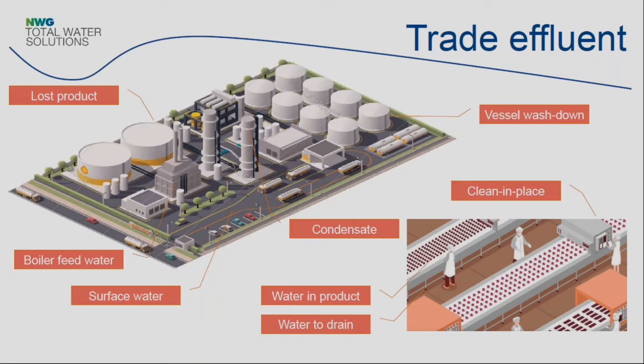And they were looking at treatment processes for that. Having done an audit, having done a walk around of the site and talked to the engineering managers and the maintenance managers on site, it became clear that there were options for preventing that material from going down the drain. And they actually put them in place. They realigned their drainage and they managed to exclude this stuff from the effluent. So that really saved them a problem. It saved them money, and it's improved their compliance with their trade effluent consent.